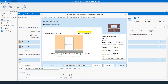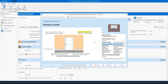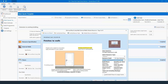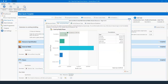Lay blocks above DPC also shows bricklayers and a mate. Looking at the plastering, we can see two plasterers and a mate — and now that we've created our 'Plasterer and a Mate' resource, we can select that instead. You always have the cost breakdown available here as well — just click it to see how costs are tracking throughout.